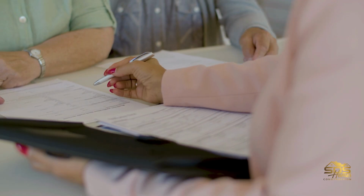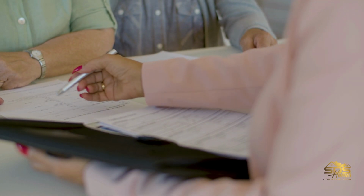It's crazy. So school fees is a big one, guys. You really do have to take that into consideration. Just do $5 a square foot and expect that's what you're going to pay. Yeah, that's safe, based on your house. And then the permits, they could cost anywhere up to $10,000. Usually permits aren't that bad, but it's the school fees that'll get you.